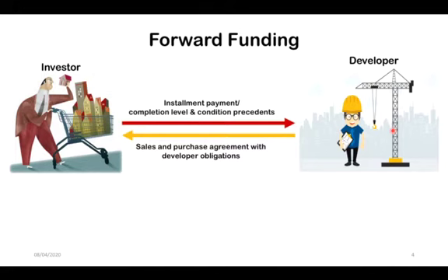The purchase price, however, contrary to a forward sale transaction, will be made in installments, depending mainly on construction progress, but sometimes also depends on further requirements, i.e. securing of planning permission, conclusion of lease agreements, amendments of building permits, etc.